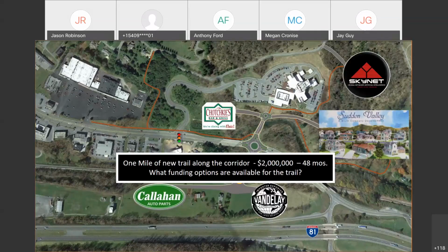EDA, there may be some components that could tie in with the EDA, given where we're coming from and providing some continuity to trails. But typically that EDA is only going to be for road or on-road facilities. Some of you may be familiar with the rec access program, where they have a separate carve out for bike ped. They don't really have that separate carve out for EDA, so it would be an EDA grant that would have to be part of on-road facilities, I believe.